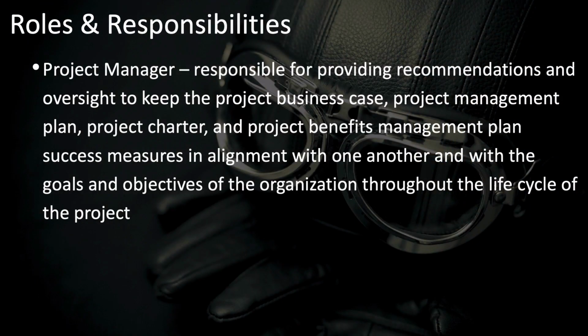And if you were wondering about the project manager's role in all of this, the project manager is responsible for providing the recommendations and oversight for keeping these documents aligned: the business case, the project management plan, the project charter, and the project benefits management plan, and making sure that their success measures are in alignment with one another and with the goals of the organization. The project sponsor is accountable for this alignment, but the project manager is responsible for oversight and for making recommendations to the project sponsor to help keep them aligned.